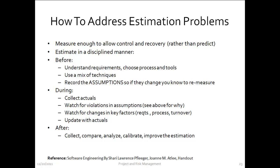To address all these problems, the first is a change in philosophy: rather than measuring to predict, you measure to monitor, control, and recover. The second is to estimate in a disciplined manner — not just intuitively, but systematically: understand the requirements, choose the process, understand what work products you'll create, and break the problem down into smaller components to estimate.